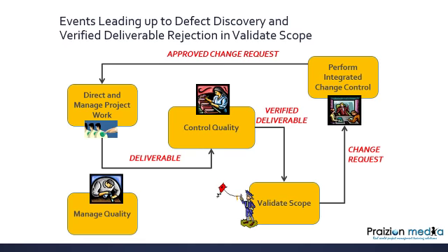It's one of those very important sub outputs that falls under the ubiquitous project documents that we see almost everywhere in the processes across the PMBOK guide. So as you're putting in your change request, just remember a change log is capturing what the change request is and the evolution of that change request. Okay? Bear that in mind. Thank you, Rajda. So Rajda has chatted that in again.